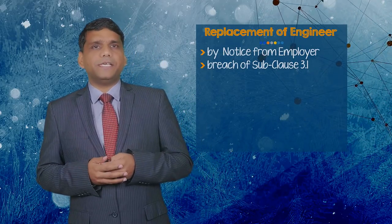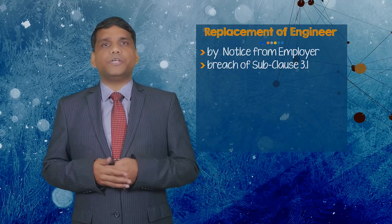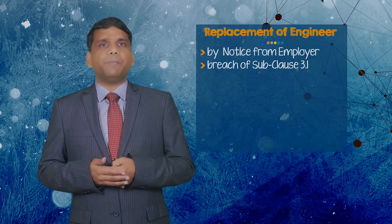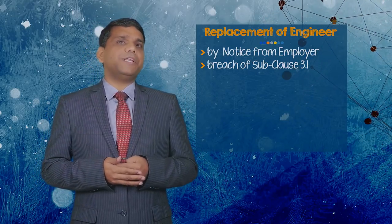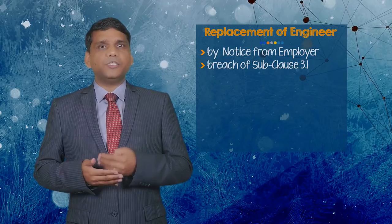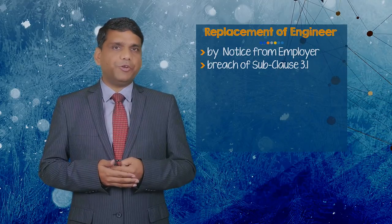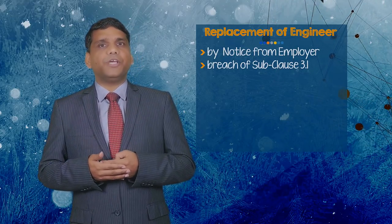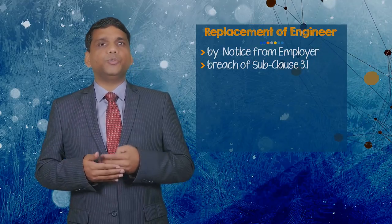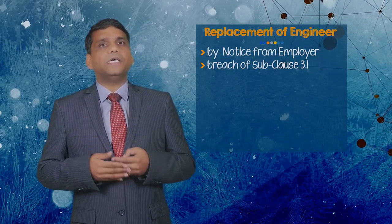Under sub-clause 3.6, the employer may replace the engineer by giving the contractor 42 days' notice before the intended date of replacement. The notice should comprise the name, address, and relevant experience of the intended replacement engineer. It is to be noted that this notice should comply with the requirements set out in sub-clause 1.3 of FIDIC — notices and communications must be in writing, sent to the correct address by an approved means, and copied to the engineer. However, the employer is not required to give reasons for the replacement.